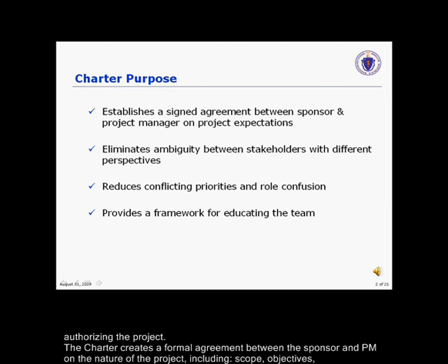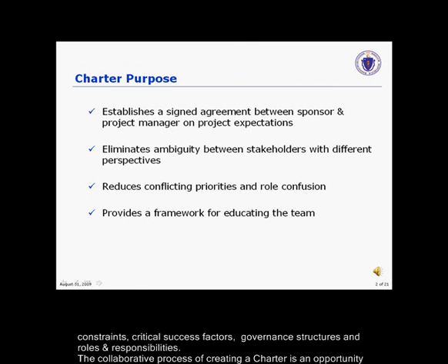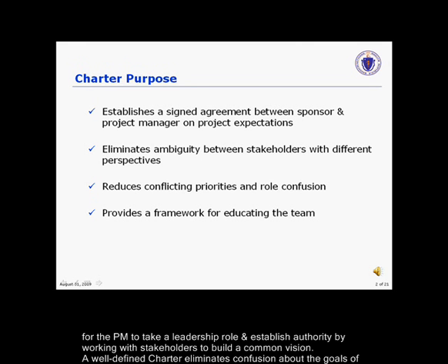The charter creates a formal agreement between the sponsor and the project manager on the nature of the project, including scope, objectives, constraints, critical success factors, governance structures, and roles and responsibilities. The collaborative process of creating a charter is an opportunity for the project manager to take a leadership role and establish authority by working with stakeholders to build a common vision.